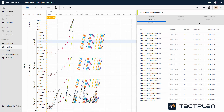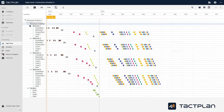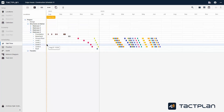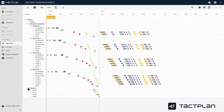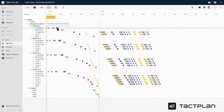To your left you find TagTime. When you click on this, you have the locations to your left and the time at the top. You can open and close locations so you can see the entire project or dive into a specific location. You can add a task, create dependencies between tasks, and drag to adjust the length of tasks.